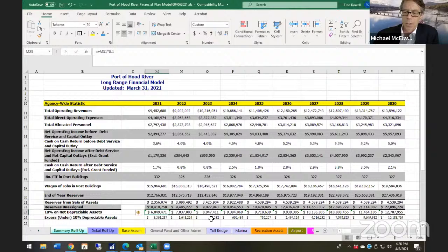The specific one you mentioned is just some erosion that's occurring underneath the approach ramp next to the pedestrian path. It's a really modest amount. I think what did we budget for that, Fred? It's about 40,000. Yeah, and it will probably cost in the order of 20 or 25. So that is something that's needed to forestall or prevent the erosion that's occurring under there. And that does need to take place in the next couple of years.